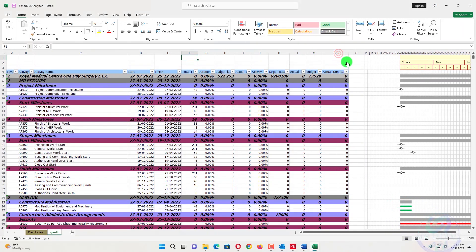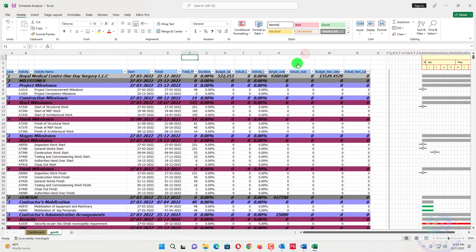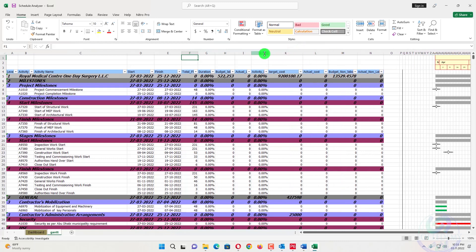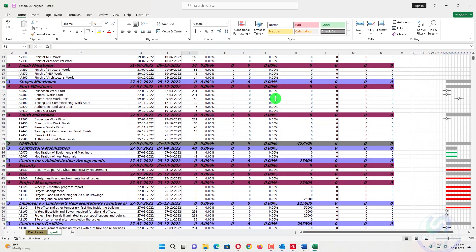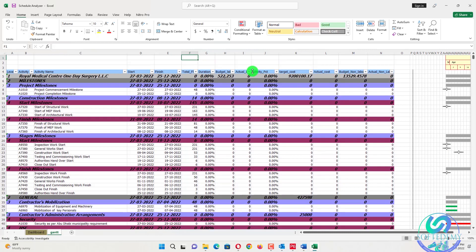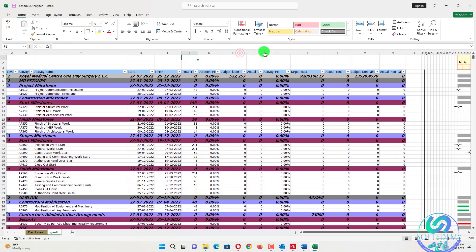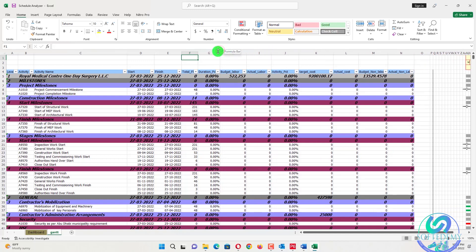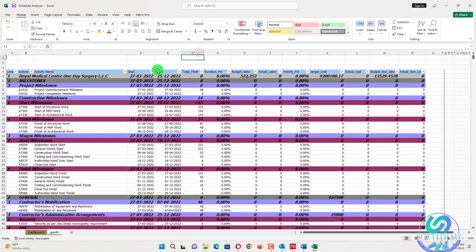All the columns I selected are displayed: actual non-labor, budgeted non-labor, actual cost, budgeted cost, activity percent complete — shown as performance percent where you can write and update — duration percent, budgeted labor, actual labor, float, start, and finish. You can also add additional columns here.